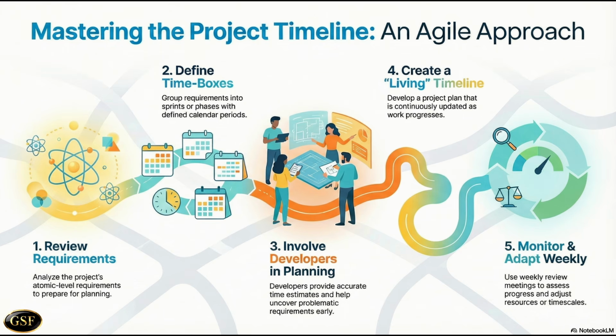Involving developers during the planning phase is recommended. Firstly, to allow them an overall view of the project and to hopefully uncover any problematic requirements, as well as estimating the time to complete each of them, as only the developers who will write the code can accurately estimate how long each requirement will take to code.